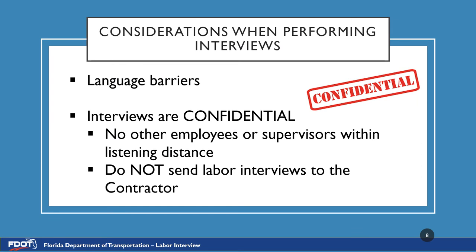Considerations when performing interviews: there may be situations in which an employee who was randomly selected for an interview cannot speak English. In these situations, you will need to find someone on site that can act as a translator. If you cannot locate anyone, please get the employee's name, number, and preferred language and give this information to the RCS. The RCS will then coordinate a meeting with the employee and a proper translator to conduct the interview. You will still fill out the observation sections H, I, and J to notate what they were doing on the day of the interview. This process is in place to ensure that employees are not being excluded from the labor interview pool simply because they cannot speak English, and it still meets the requirement of choosing employees at random.